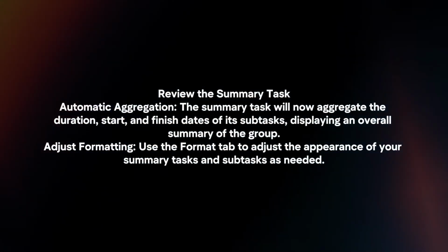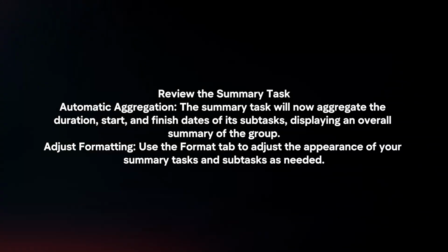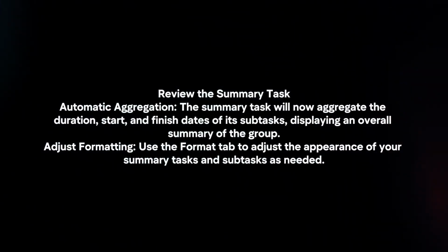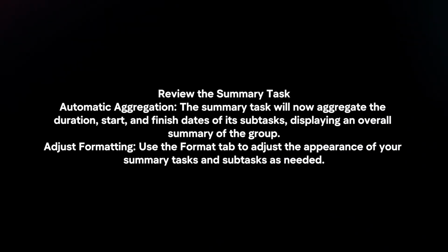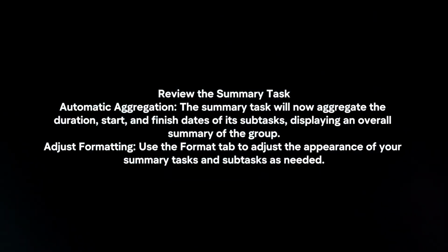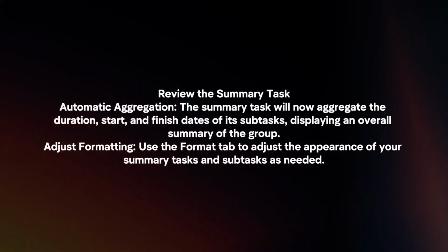Review the summary task. Automatic aggregation. The summary task will now aggregate the duration, start and finish dates of its subtasks, displaying an overall summary of the group. Adjust formatting. Use the Format tab to adjust the appearance of your summary tasks and subtasks as needed.